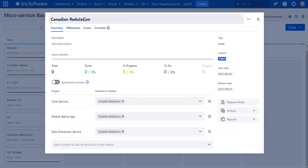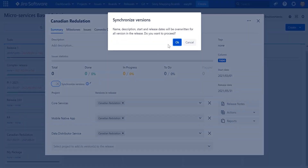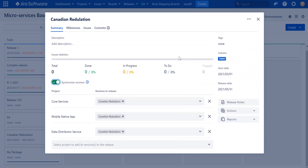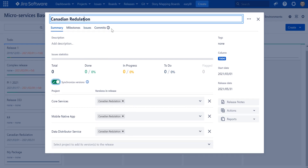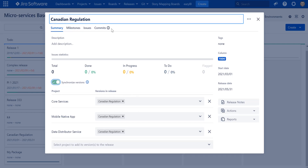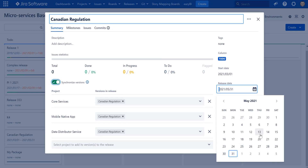I realize I made a spelling mistake — I wrote 'Canadian Regulation' incorrectly. This mistake was propagated to every project version. Rather than fixing each project manually, we have a synchronized versions functionality that can automatically update the name, description, start date, and release date across all versions to keep them in sync across multiple projects. Let me fix the mistake now.